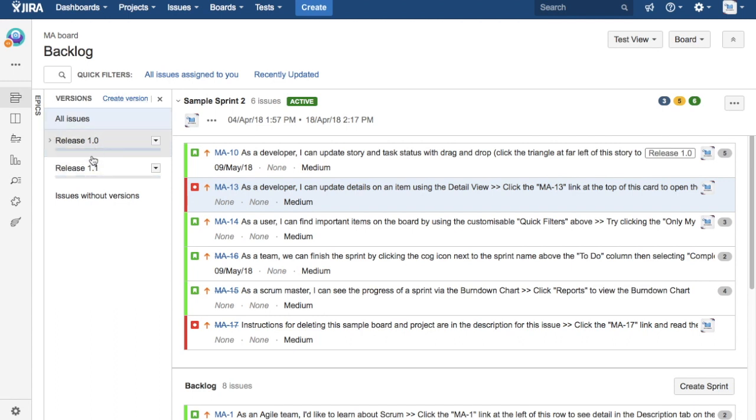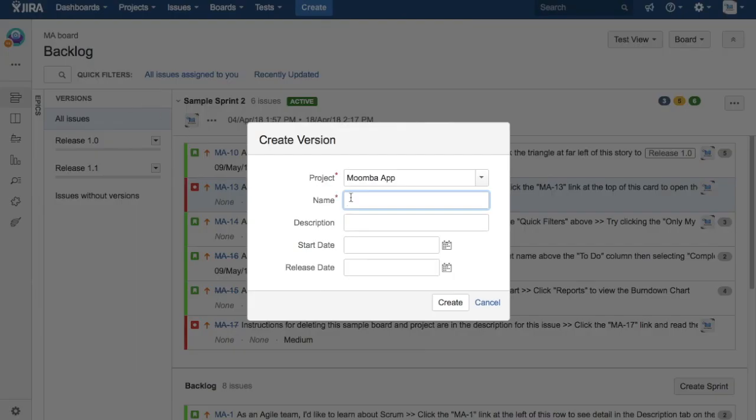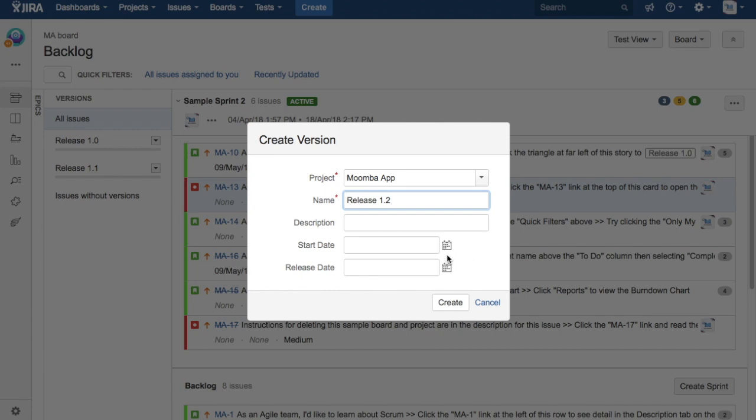You can quickly add new versions in that particular project from here itself. You just need to have project admin permission to create the version. Click on the create version link here and provide the name of the version. I'll say release 1.2 and just create. If you want to provide start date and release date, you can provide that or that's an optional field.